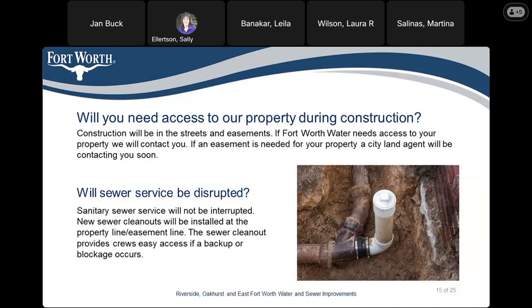We will need access to your property during construction. The construction will be in the streets and easements, but if Fort Worth needs access to your property, we will contact you. If an easement is needed, a city land agent will be contacting you soon, since we are still in the design phase. Will sewer service be disrupted? Your sewer service will not be disrupted. New sewer clean-outs will be installed at the property line or easement line, providing crews easy access if a backup or blockage occurs.